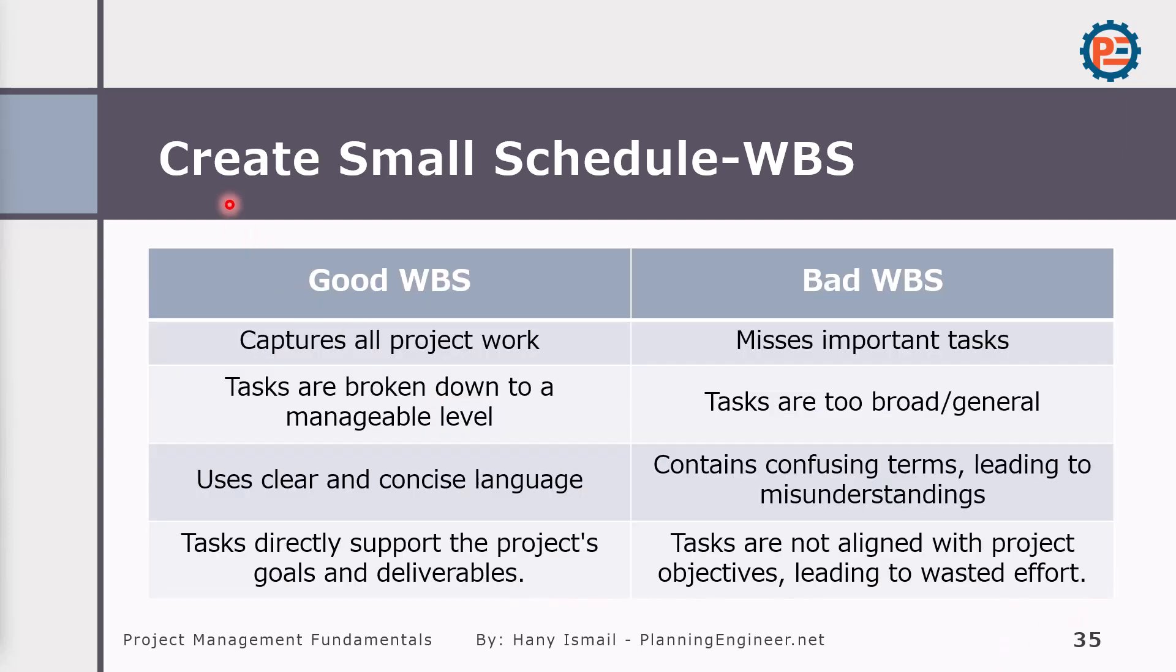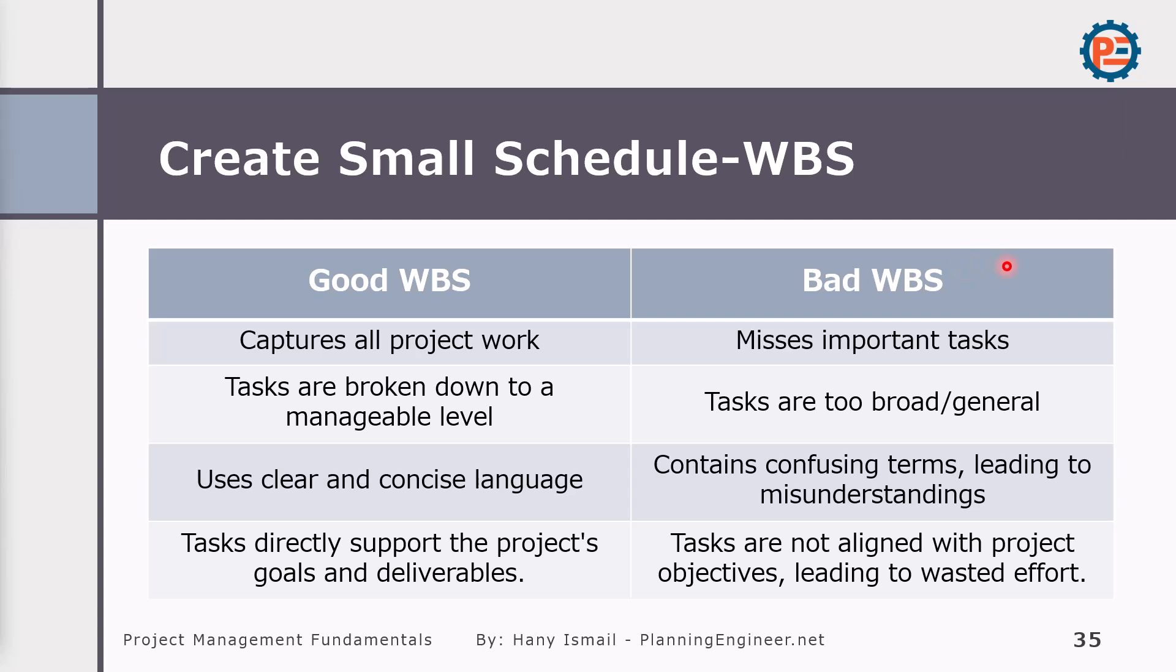So creating a small schedule, WBS, what we are doing now, will give us the opportunity to talk about good WBS and bad WBS. The good WBS will capture all project work. Tasks are broken down to a manageable level. Use clear and concise language. Tasks directly support the project goals and deliverable. However, the bad WBS will be missing important tasks. Tasks are too broad or general, contains confusing terms leading to misunderstanding, or tasks are not aligned with the project objectives leading to wasted efforts.